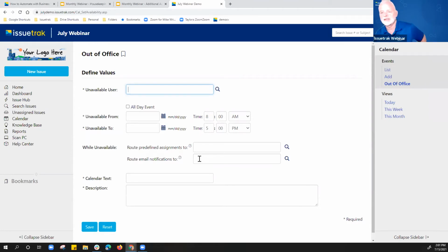And like that one where we had Patrick, where he was going to be assigned to a task, we give a warning to the user who wants to manually make the change. The manual change can still occur. I could still assign a task to Patrick. It's not going to prevent it. It's just going to tell me he's not available at this particular period of time. Nice functionality and feature.